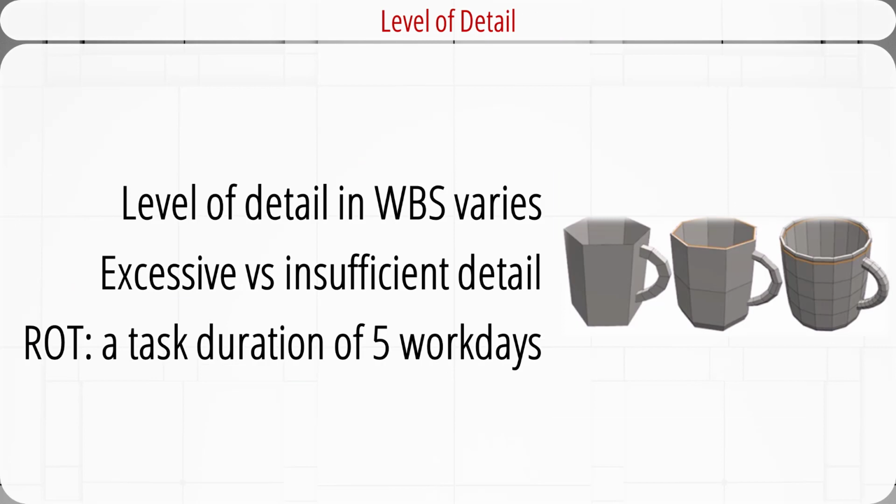When building the work breakdown structure for a project, the level of detail varies with the complexity of the project, the need for control, the project size, cost, duration, and other factors. Excessive detail is costly because it forces a focus on individual lowest level sub-deliverables rather than on high-level deliverables of the project. And it also creates unproductive paperwork. If the level of the work breakdown structure is increased by 1, the number of cost accounts may increase geometrically. This will also increase the estimating work during the planning phase.